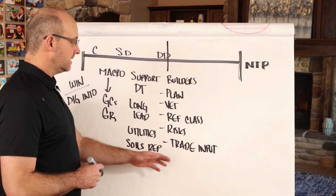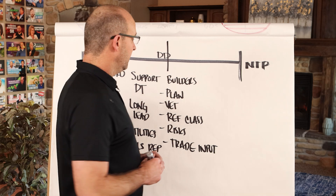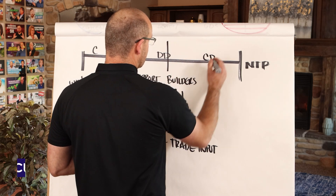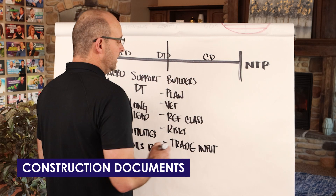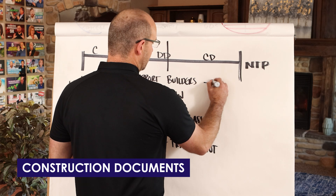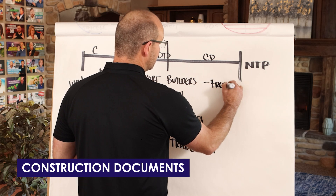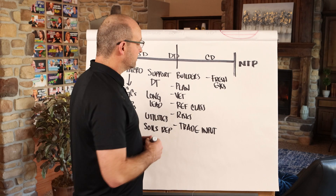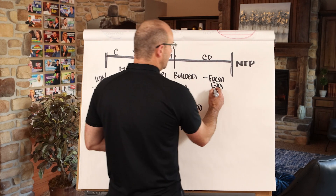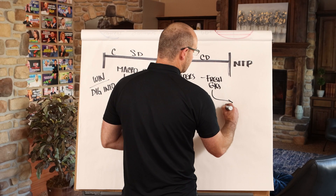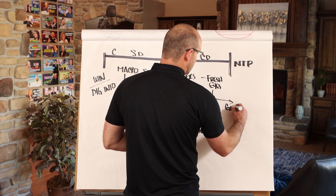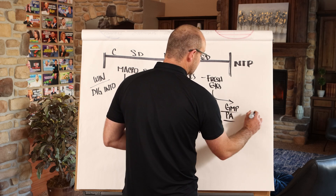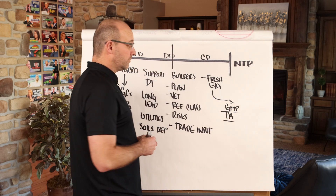If you have early design-assist trade partners, design development is the phase where you engage them. Then when you're in the CD phase, you'll want to conduct what's called a fresh eyes meeting — to tear apart your plan and make sure it's accurate — so you can submit and get your GMP approved and potentially include these deliverables in the prime agreement.